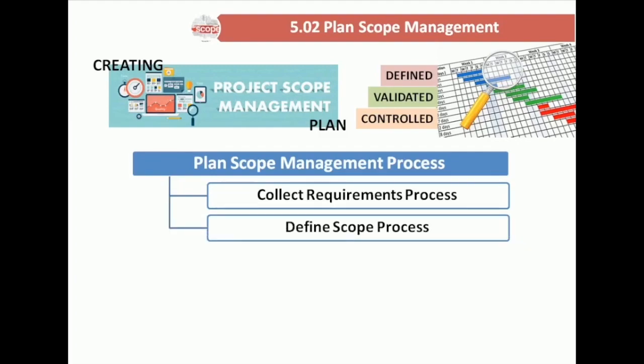Define scope process. Here's where you take your requirements and turn them into a detailed description of the product or service that your project is going to create. You will end up with a project scope statement which you can refer to during the project. It will include a list of what's in scope and what's out of scope.